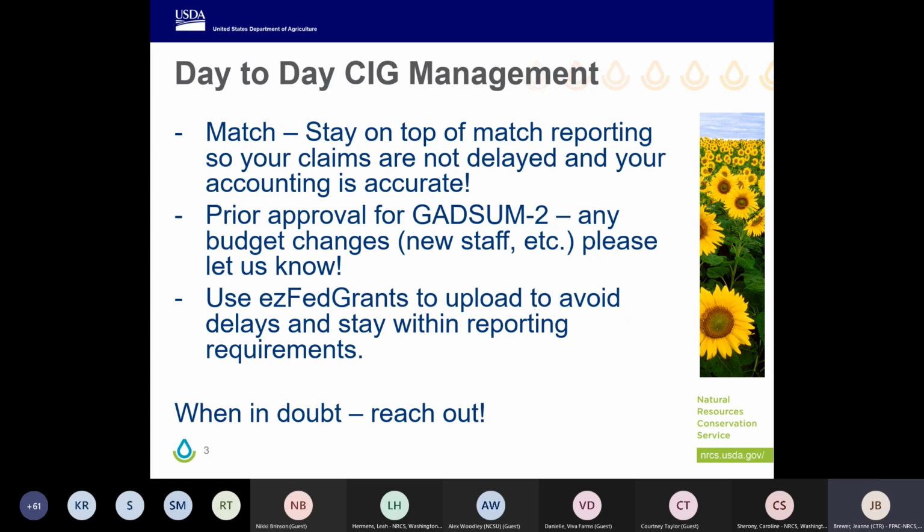And then let's see what else. Oh, also, towards the end of your project, or at any time really during your project, if you find that you're going to need extra time to complete your deliverables and the project needs another 6 months to a year, there is a form that we'll send out, the no-cost extension that Caroline described earlier. Please reach out to us as far in advance as possible. I will be more than glad to give you that form.